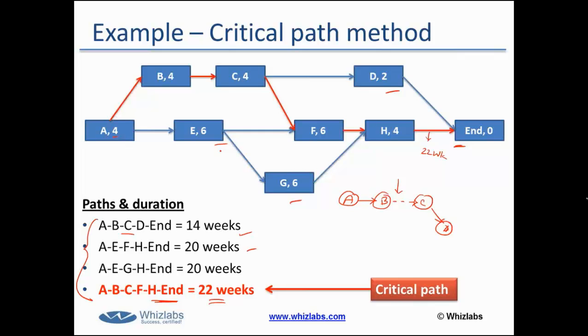If there is a question in the exam asking that the duration of a critical path is 20 weeks, what is the duration of the project? The answer is 20 weeks. Critical path indicates the duration of the project.